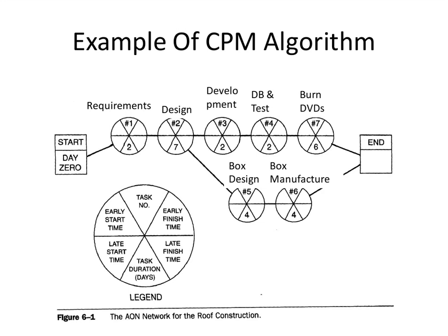It's the critical path. Okay, now, can we fill in this one right now? This one with the branch? No, we can't. Why? What does it depend on also? The other path. After all, it could be that it's constrained by this other path, in theory. Okay? In this particular case, not, because the critical path is at the top. Okay, so let's fill in this next one. So this task number 6 down here on the lower right, what is the latest finish for that?